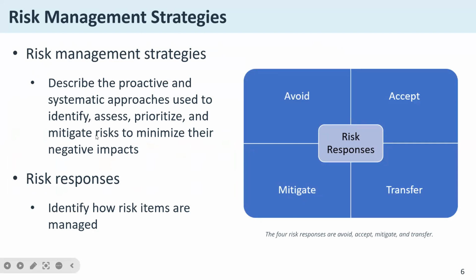Now, if you have a risk, how do you manage it? There are 4 ways. At times we call them risk responses. You avoid. That's to say you don't even embark on that project altogether, or you don't get to do anything with respect to that. Or you accept it, especially if it's a bearable risk. Then at times you mitigate. That's to say you ask yourself, okay, what are some of the countermeasures?